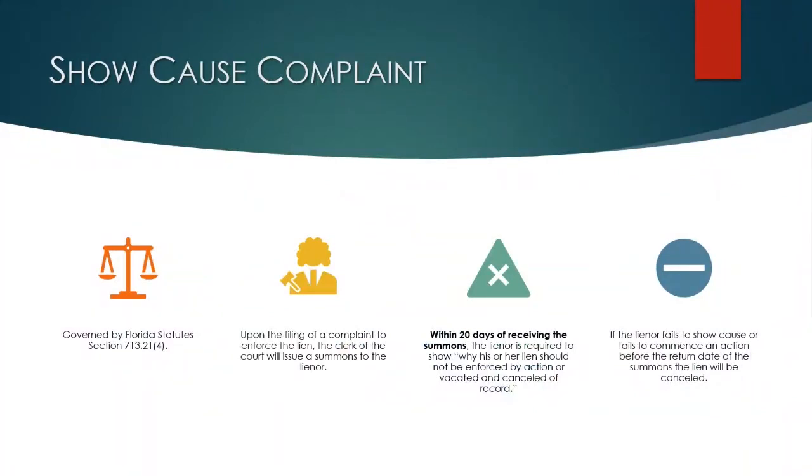So, show cause complaint. This is, again, governed by Chapter 713 of the Florida statutes. This is one where you have a really, really short period of time within which to foreclose. Again, typically you have 1 year. You get a show cause complaint and you don't file your lawsuit within 20 days to foreclose that claim of lien, your lien's gone.